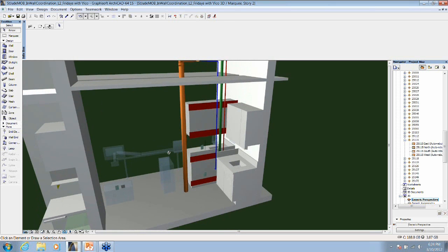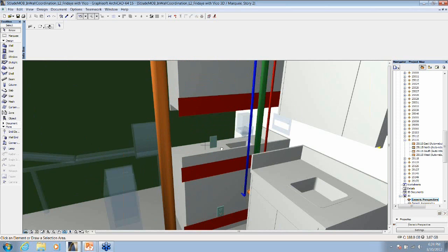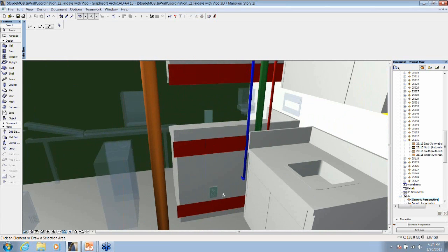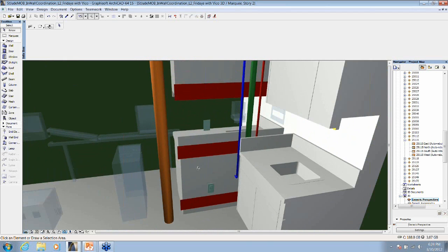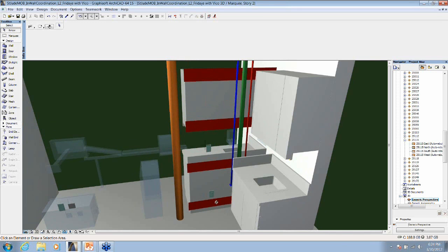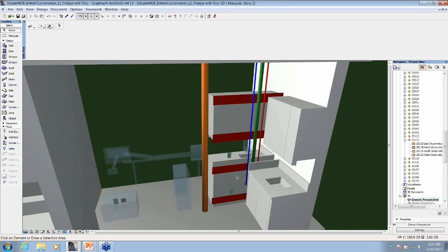The other beauty of building everything in 3D, and I think I will have a better example for that, but let me mention it here as well, is that we not only built the dedicated rooms which were actually coordinated, but also the neighboring rooms. So when we wanted to locate a power outlet on one of the walls that we coordinate, we actually knew where the other power outlet would go on the other side of the wall. So we could make it simple for the site team, and we could just align them to be able to faster, to be able to speed up their process.